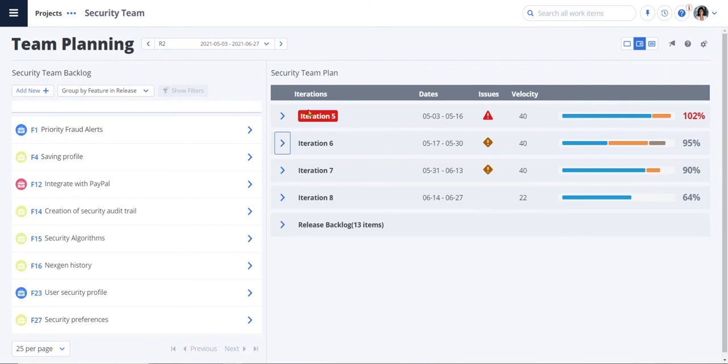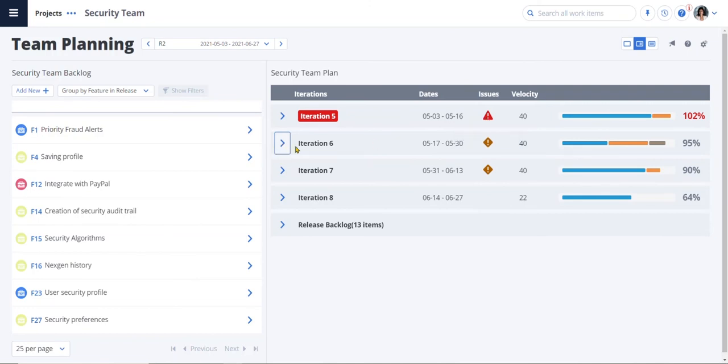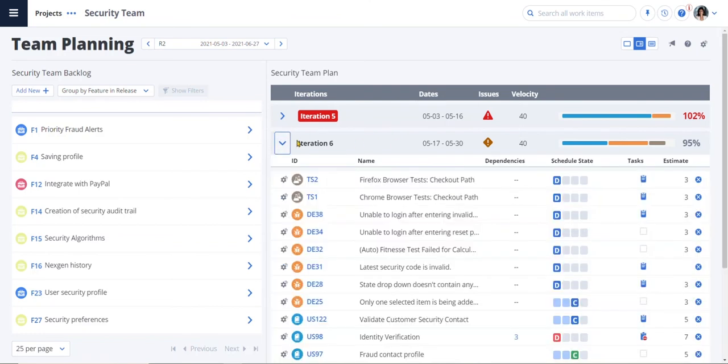The difference between them is that we have moved from what-if scenarios to the actual work being committed to. We see that we have a warning on iteration 5 due to a velocity of 102%. We'll probably want to work on this because otherwise we won't have any wiggle room. If I look at iteration 6, I can see there's another warning.